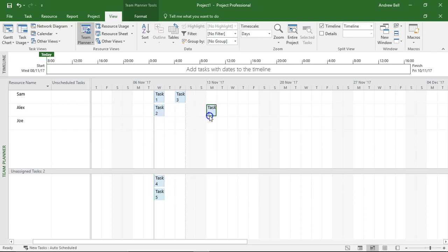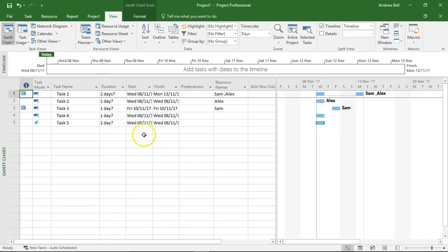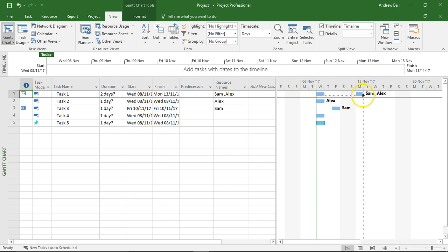In fact, to demonstrate this, let's push this all the way over to next Monday. Go back to the Gantt chart view, and now we can see that actually, you know, Sam's going to do his work on Wednesday and Alex is going to do the work on Monday. It splits the task.